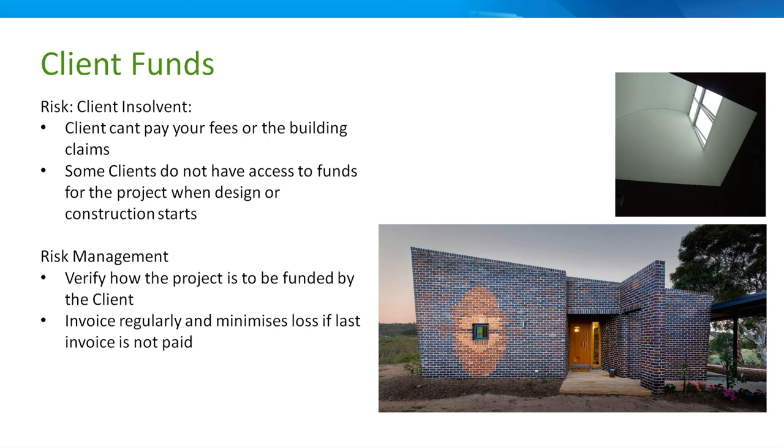Run it at QA level as much as you can and return the information. So, I understand you want this, this and this. It's called a return brief. What did you say? You said this. Return it to them and ask them to verify it. It's about managing risk through polite, systematic communication and verification.